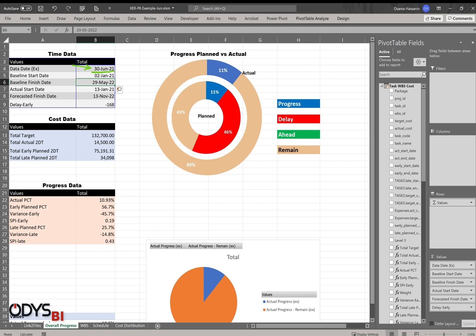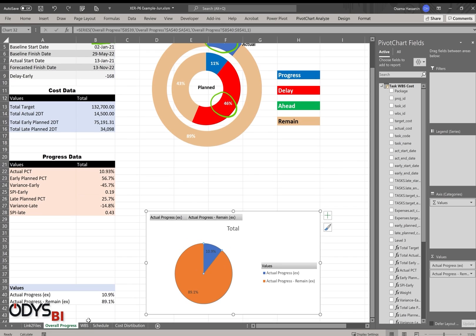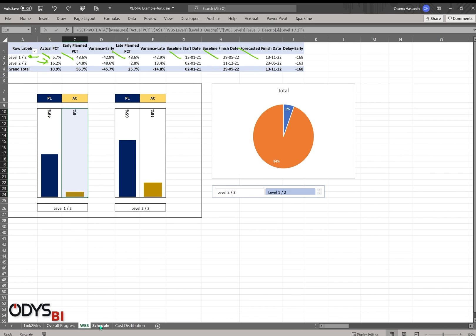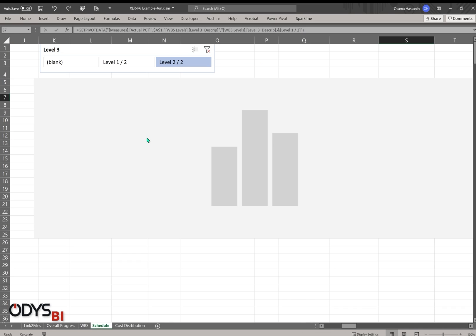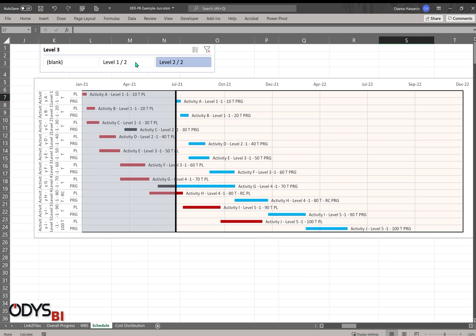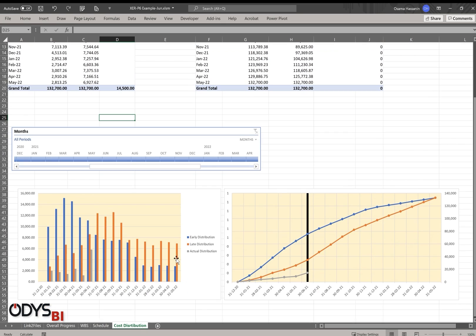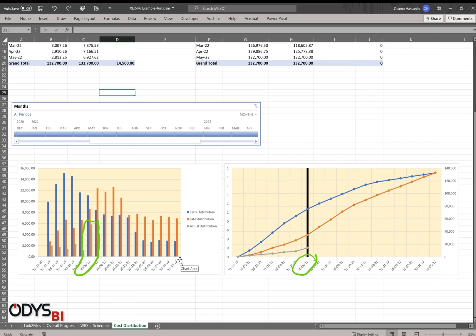Now the data date changed. All the progress, all the percentages, all the cost, everything updated. Even these charts that we have created before. In the WBS, everything changed. Schedules also changed. As you can notice here, the actual cost is end of June. Data date is now end of June. Once you identify the new XER and then refresh the data, you will get all the update. It will vary from few seconds up to minutes depending on the number of activities in the XER and also the model itself that you created for your reporting.